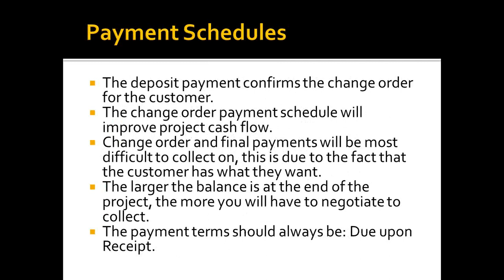The change orders will certainly help improve cash flow. On some design build projects, these change orders can become fairly costly, fairly large, so it'll certainly help the cash flow. And just remember, the most difficult payments to collect on any project are change order payments and the final payments of a project, so we want to keep those as small as possible.